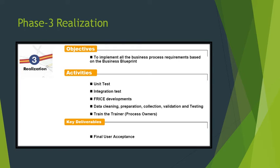The third step is realization. With the completion of the business blueprint in phase 2, functional experts are now ready to begin configuring SAP. The realization phase is broken into two parts: your SAP consulting team helps configure your baseline system (called baseline configuration), and your implementation project team fine-tunes that system to meet all your business and process requirements. The initial configuration completed during baseline is based on the blueprint documentation, and approximately 20% of configuration not tackled in baseline is completed during fine-tuning. Fine-tuning usually deals with exceptions not covered in baseline configuration.